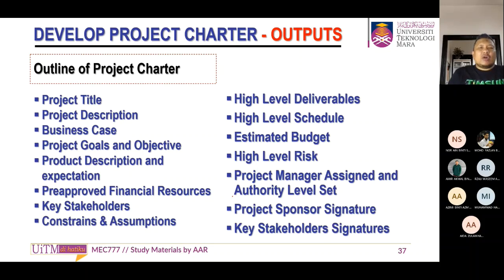Alright. This is the outline for the project charter. When we develop the project charter, we must have the project title, project description, business case, project goals and objectives, product description and expectations, pre-approved financial resources. This is an element I talk about every semester. But when it comes to the charter, I'm quite disappointed. They don't follow this. Key stakeholders, you need to define who your key stakeholders are. Constraints and assumptions.